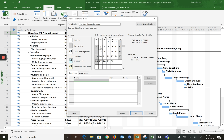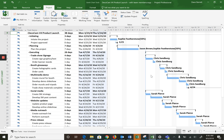We click on the day itself, and now we'll say this is a stat holiday. It goes to the day we selected. It's an exception, so because it was previously a work day, it will make it a non-working day when we press OK. We'll do that. Notice what happened — Monday is now gray, we're not scheduling work on it, and it bumped our schedule out by essentially a day. So those are the two tools: one affects a whole day type consistently for your project, and the other lets you affect certain specific days.